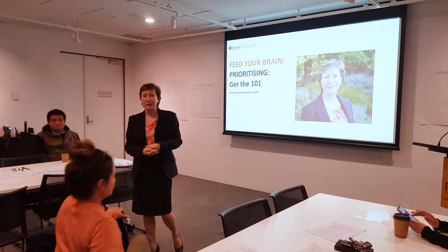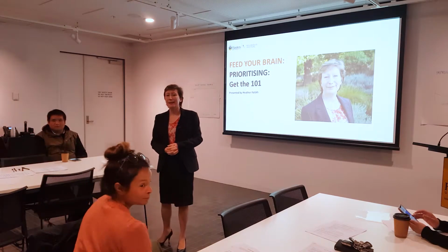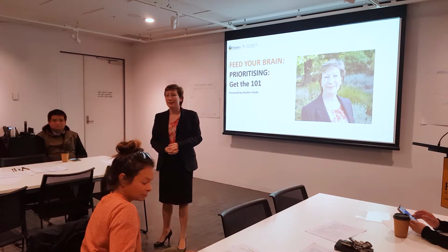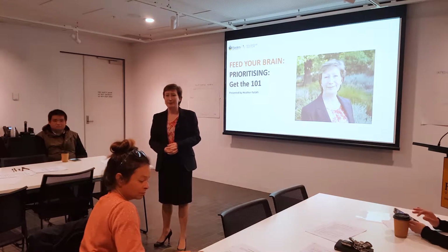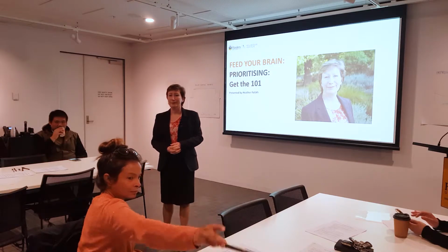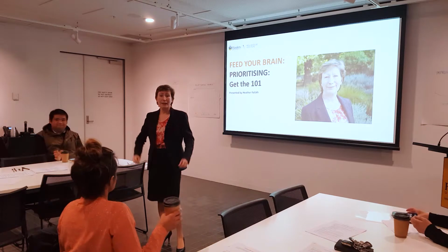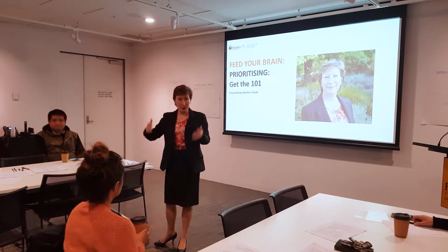How else do you prioritise? Sometimes I prioritise based on phase. If some items are vague or they could become quite complex, I try to address them early to identify how vague or how much effort they actually need. So you scope out all the things that need to be done, great, and then you prioritise.